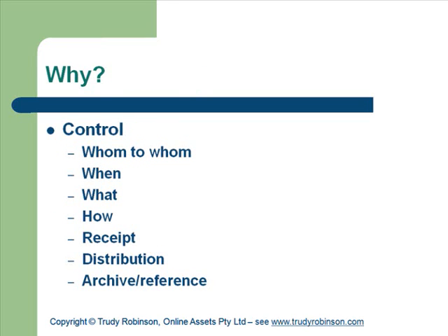So what you want to be able to control is who talks to whom, basically. Because if you've got levels of infrastructure in your project, so you've got team members, project managers, sponsors, etc., you don't want somebody from the team talking to the sponsor unless they've been given the right to do that. Because if they ring up to whinge about something or tell tales on somebody, it completely disempowers everybody else in the cycle. So you want to be able to say, you can talk to that person, you can talk to that person. If you want to make a complaint about your team member, you come by me, it goes up the chain and down the other side. However you want to do it, whatever works for you, but you make sure you predetermine what it is and who's going to talk to whom.